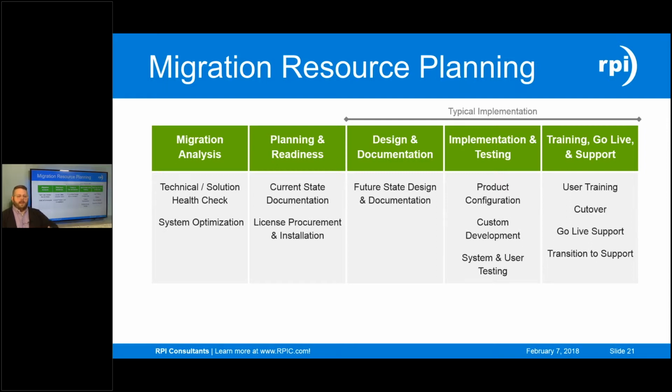Now keep in mind that also running concurrently with a lot of these phases is almost a separate project. You've got the legacy document conversion should you choose to do that. So there's concurrent efforts in implementing the processes and implementing the document conversion.